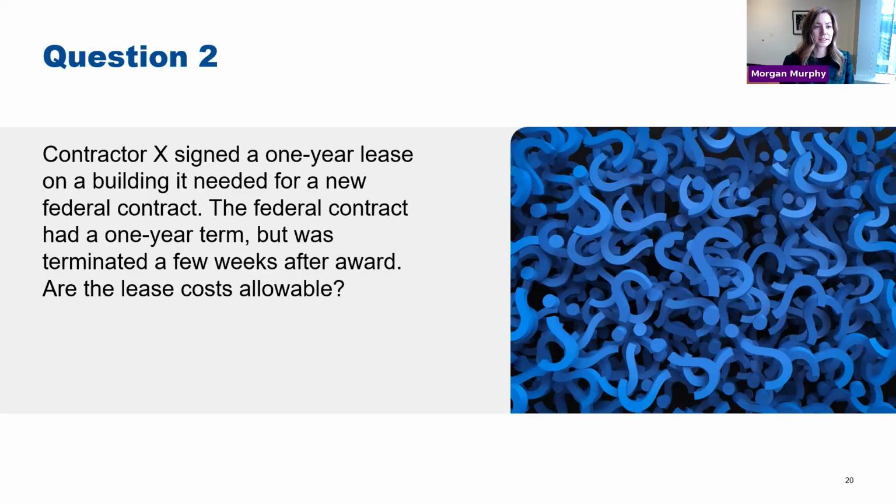Now, that being said, let's see, do you have a termination clause in there, right? So perhaps there's a 6 months termination kind of clause in that agreement. Okay, you might be able to recover then those 6 months, but then you need to work to have that termination set up with your landlord. You could also look, let's say it's a slightly longer lease. Perhaps the government is going to expect you to try to find a person or another company to come in and substitute and take over that lease. So let's say you have a 5-year lease. Can you find someone to come in and take that over? What would be reasonable for that?